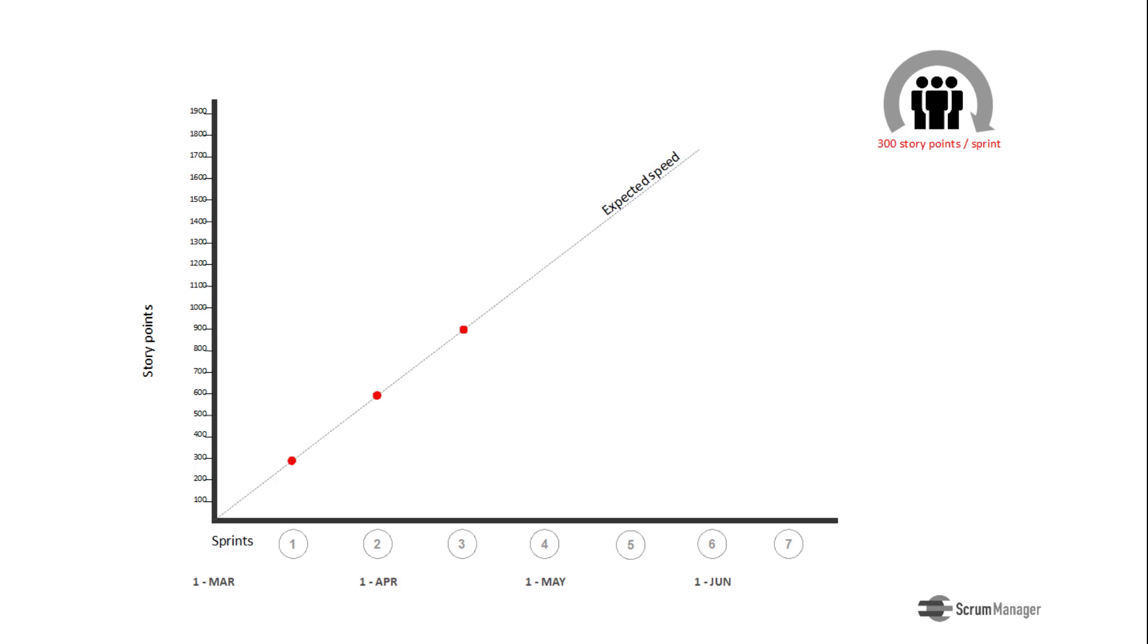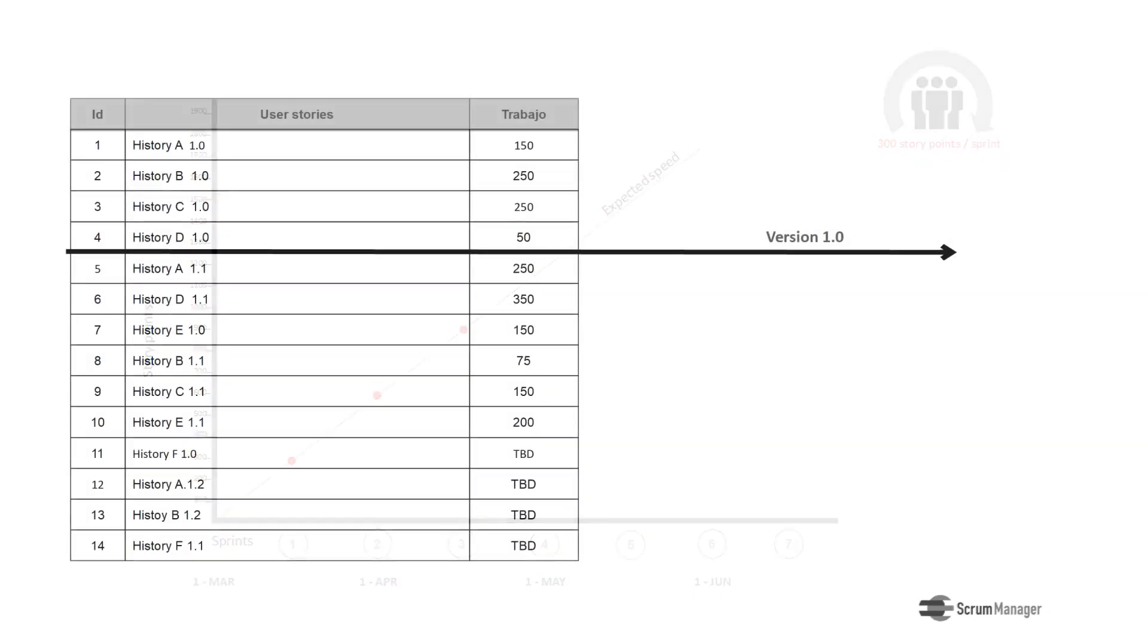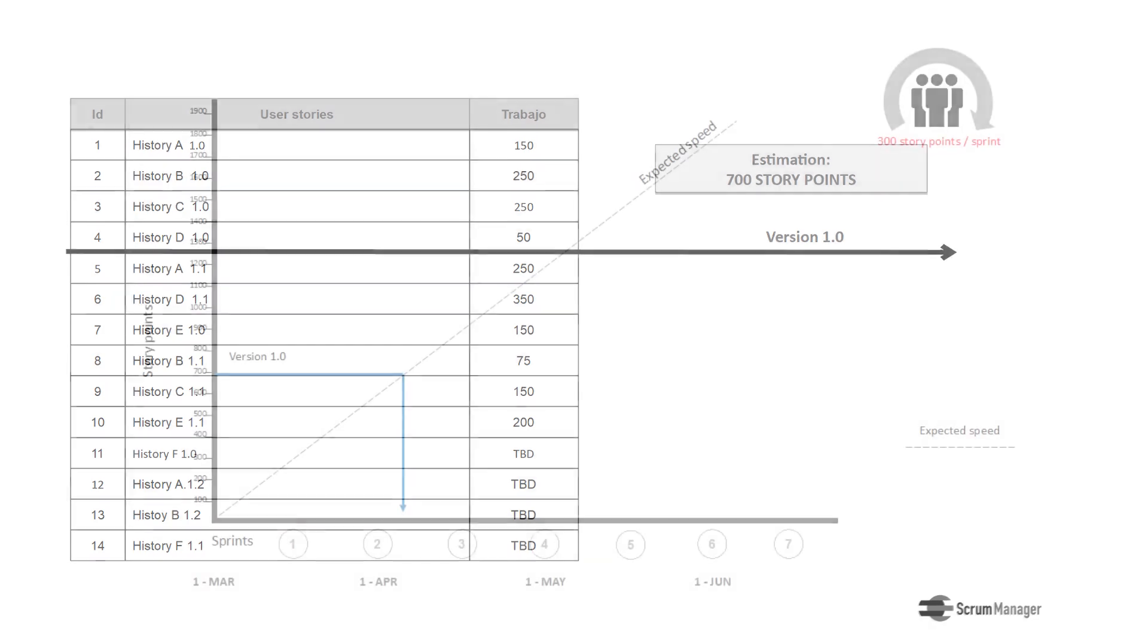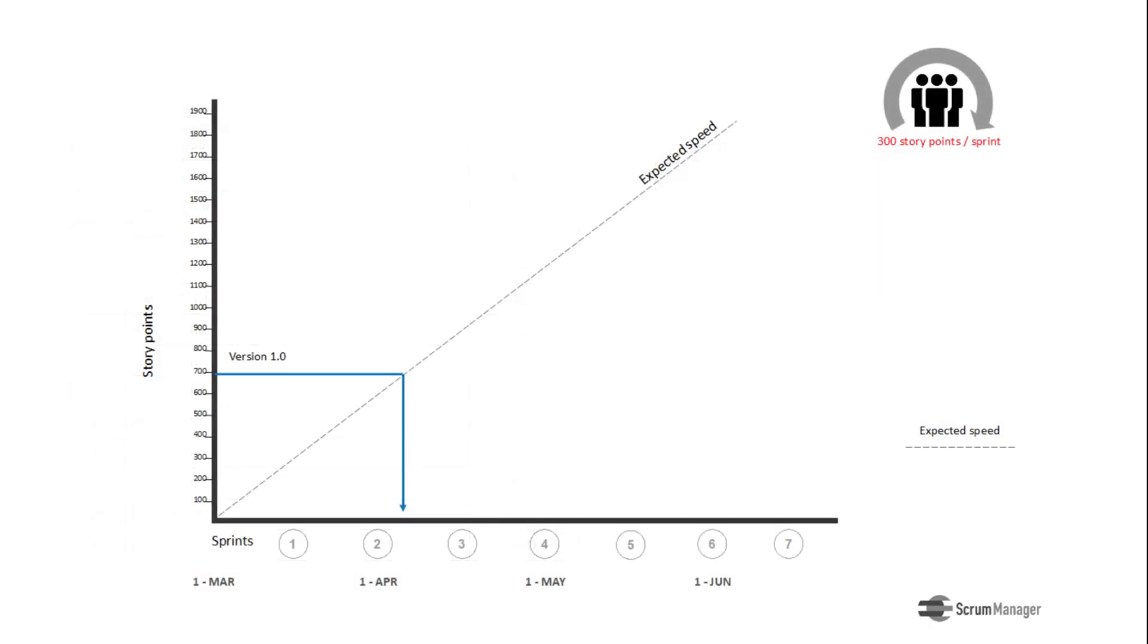Let's now assume that the product owner has planned to have the minimum viable product, or version 1.0, when he has the first four stories on the product backlog. The estimates for these four stories add up to 700 points, which in the graph project, show in the horizontal axis, that they will be done by the end of the third sprint.